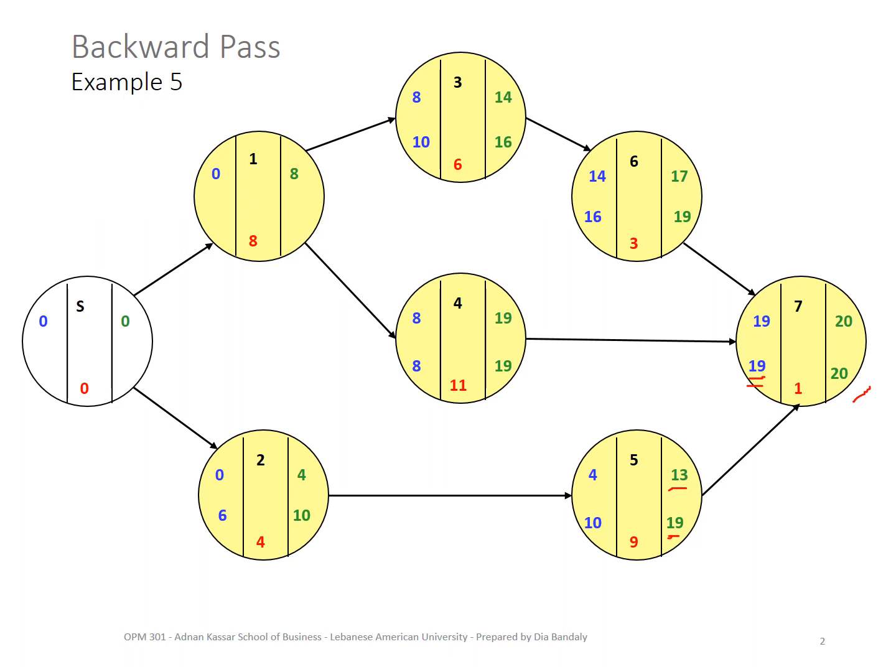Yes, activity 1 is an immediate predecessor for 2 activities, 3 and 4. Activity 3 has a latest start of 10, and 4 has a latest start of 8. So I cannot allow activity 1 to be delayed to finish after week 8. Why? Because otherwise 4 will be delayed. So that will set my latest finish for activity 1 to be 8. Here we go. Then 8 minus 8 is 0.